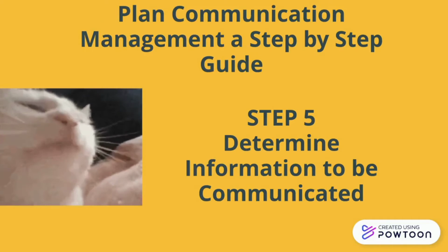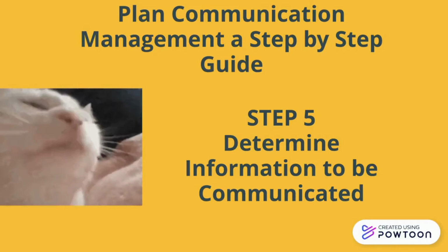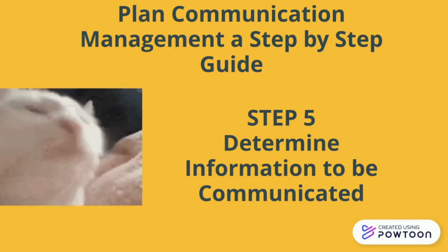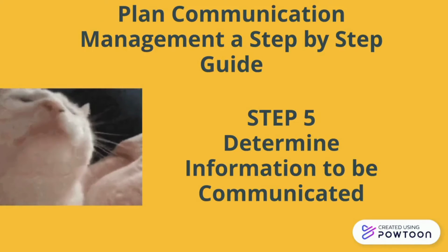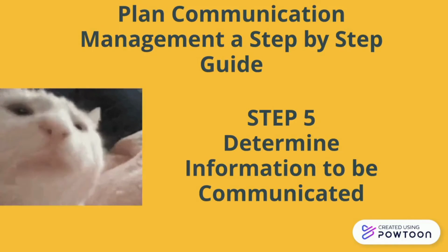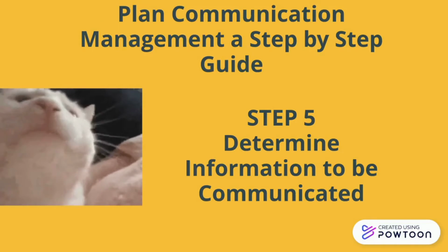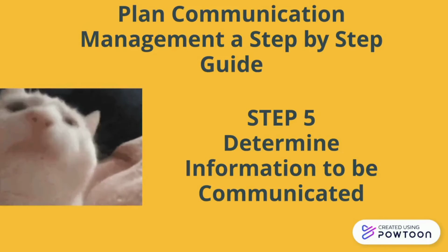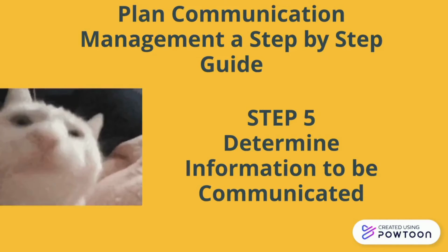Small projects allow for more simplified communication without having to provide extreme detail in the planning. However, large and complex projects, which usually have many stakeholders with differing interests and influences, require very thorough and detailed planning. For large and complex projects, it is usually helpful for an organization to provide standard documents and templates for use in formal communication because it simplifies the communication process, provides a level playing field, and promotes understanding of what is being communicated.